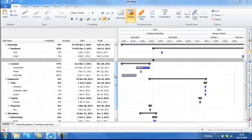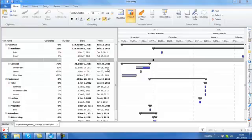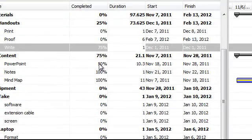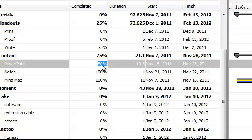Once you've populated your task information you can then start using your mind map or the project view to start managing your project. We briefly touched upon completion. You can use the percentage complete to show how complete each of your tasks are. Now there's two ways of doing that. You can click on the completion percentage and change this manually.